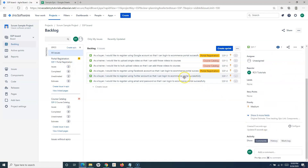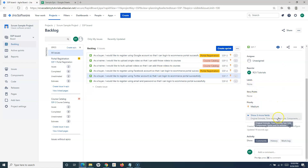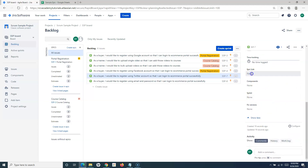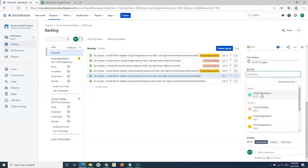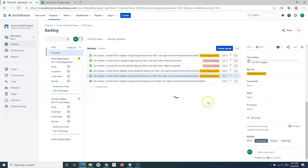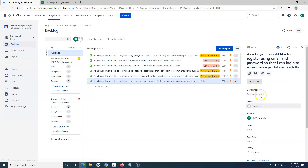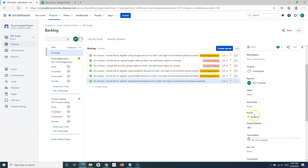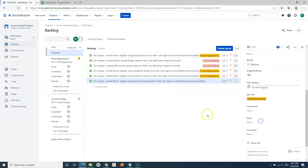To associate these stories with an epic, you can either create an issue using the 'Create Issue' link or open the issue detail and edit the epic link. I'll choose the 'Portal Registration' epic — selecting SSP1 as the project — and assign the same epic link to the other story as well. Now you can see the epic link has been updated for these user stories.